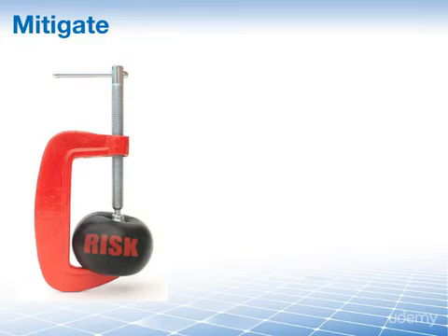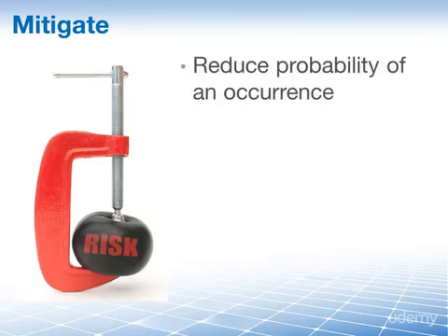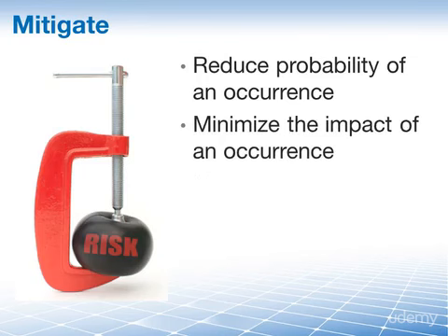Let's say you have a construction project and you're concerned about the upcoming winter and all the possible snow that could impede the progress. To lessen this risk, you might choose to pursue the construction project next spring. This is an example of risk mitigation. In this type of strategy, actions are taken to reduce or lessen the chance of occurrence, or if the risk does occur, minimize the impact of the risk through early and proactive action.